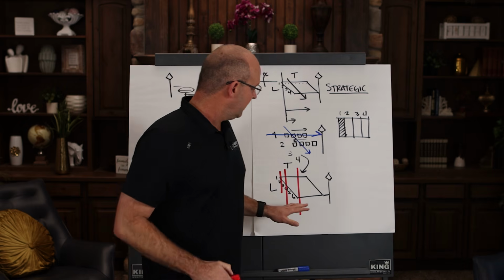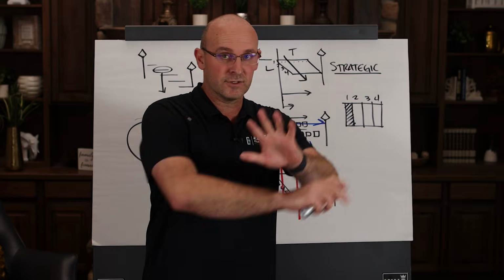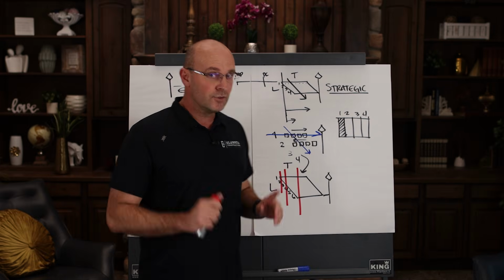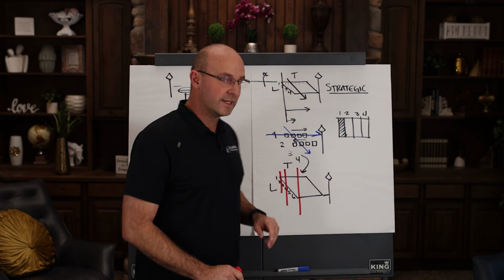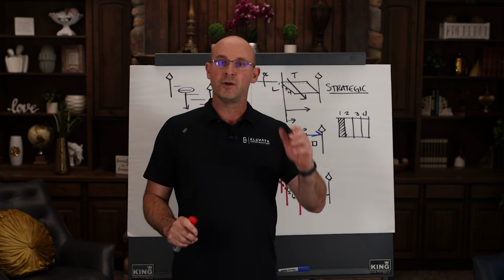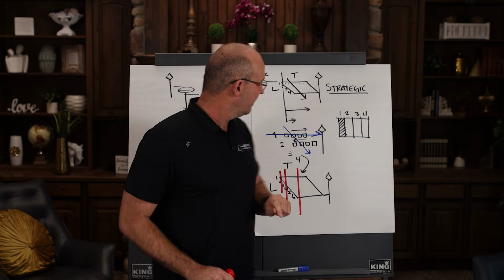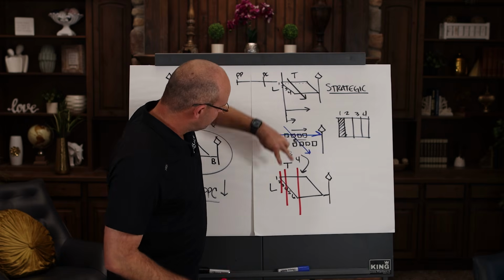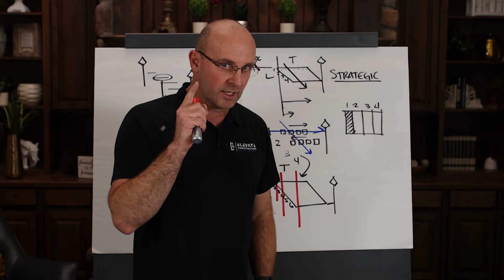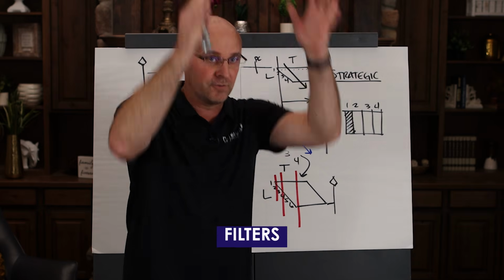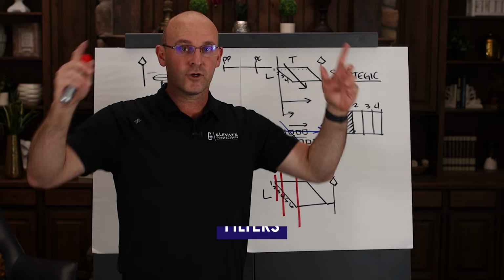Now, why would I say it must come from here instead of some arbitrary location, some random new whole cloth type deal? Because if you tell trades to go create your look ahead and your weekly work plan out of nowhere, it will not be vertically aligned to milestones, and it will not have this trade flow. That's why it must be filtered down. This is a solid gold rule. A look ahead and a weekly work plan are filters. They are not created brand new.